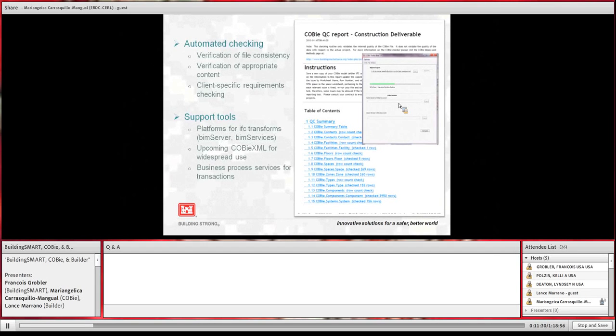For example, you might have in your file a piece of equipment that is in room 3106, and then you don't have that space. The report will tell you, hey, you have this piece of equipment in 3106, however, you don't have a 3106 space, and it gives you an easy tool to go back and check. I use this a lot, and before this came out, it was all manual checking, eye to eye with another person in the room, and it was very difficult. So I found this to be a great tool.